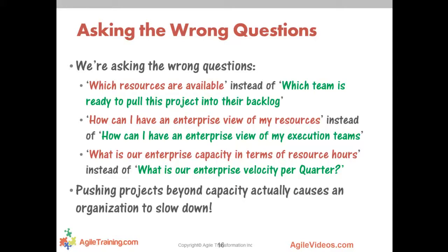It's the same exact principles that we use at the team level in terms of measuring capacity and velocity and using those numbers to help us predict future delivery. And of course those numbers can change, but they at least become some level of leading indicators. It's the same conversation that we're going to have at the enterprise level.